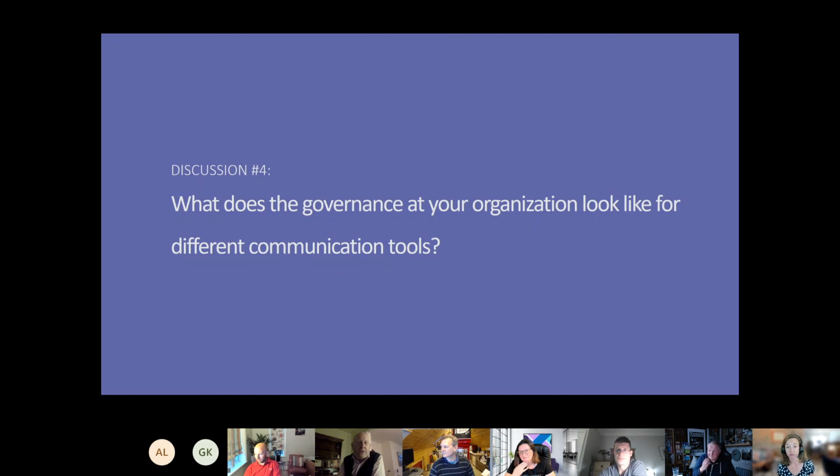I agree again with what Simon says, but I think you can bring governance to non-regulated sectors as well, and I think that's always a good thing. What we've found works, and what I've found works in the past as well, is a third party project manager that sits between the service provider and the solution provider, which would be the two Simons and Dylan, and then the client themselves. They manage the delivery of the entire project but aren't involved in the delivery. We see this works fantastically because it holds all sides accountable, without getting involved.